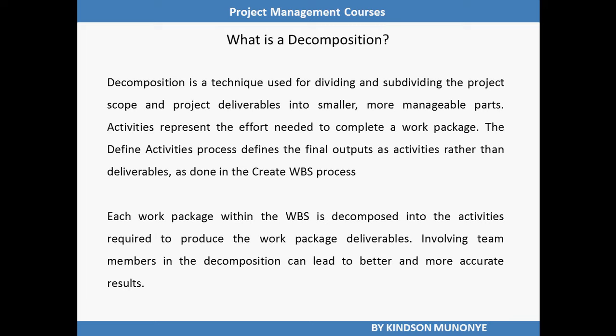So take note that the project deliverables or scope is broken down to smaller items called work packages during the scope management process. Now, this work package is now further broken down in the project time management process through a process called decomposition.